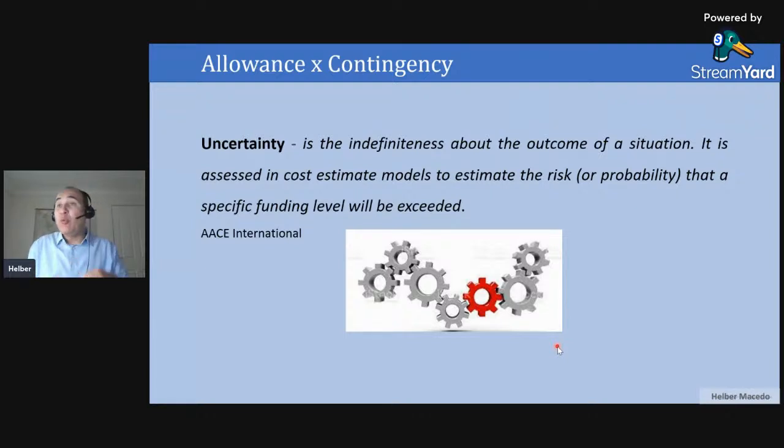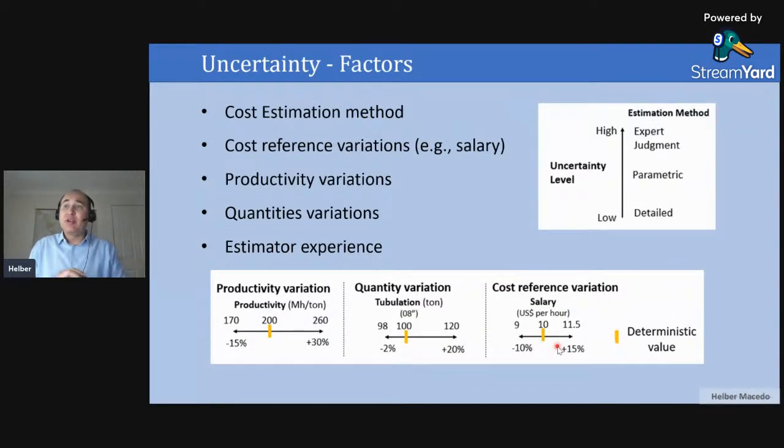So we can have uncertainties with a group of factors when I'm doing my planning, okay? I have uncertainty with the methodology that I am using to estimate my cost. For example, if I use the bottom-up methodology, of course, my level of uncertainty is not so massive because I'm going part number by part number, material by material, doing my proper estimation.